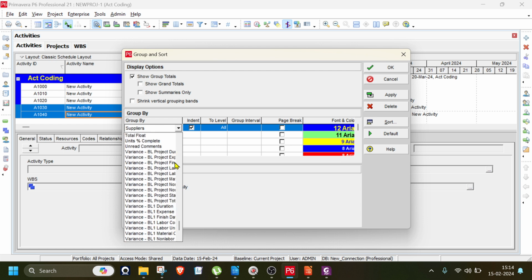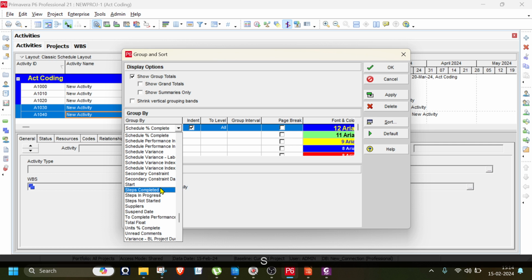Then go to create activity coding. Okay, how are you going to create the activity coding? Enterprise activity codes. Press the modify button, then create a name, then close that particular second pop-up, then it will come to the main screen, then you add two subcontractors, that's it. Sir, after assigning the subcontractor, how to display that one? What name have you given? Subcontractor. Go to it, then slowly look, it will be there.